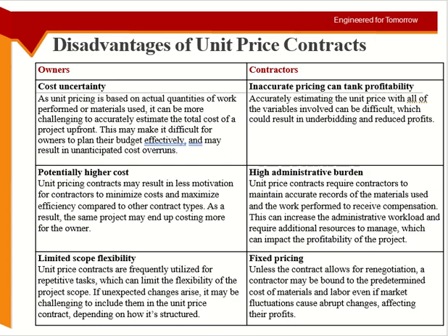Okay, you may go for potentially higher costs in this case because the contractor will try to do what? I'm getting paid on per unit basis. I'll try to do what? Increase the amount of work. Yeah, if I can somehow increase the amount of work or show the client that I did more work. Okay, so there's a chance of eventually ending up with higher cost in the end.